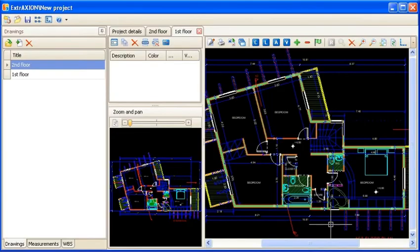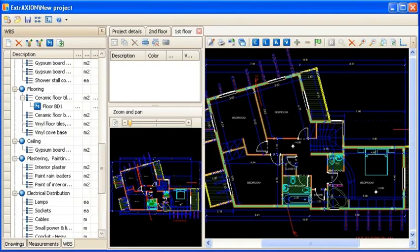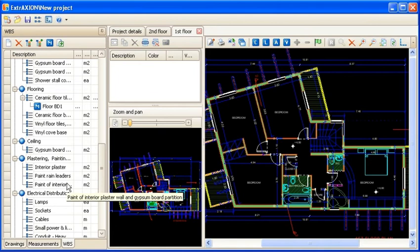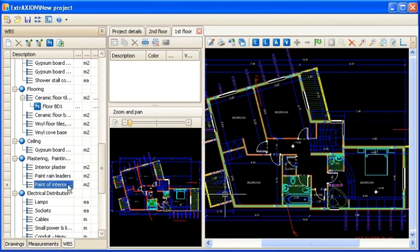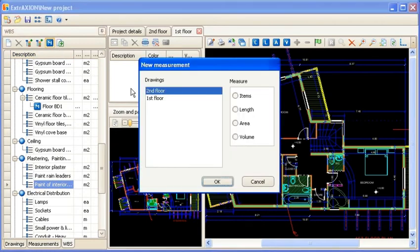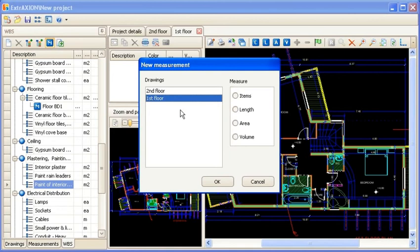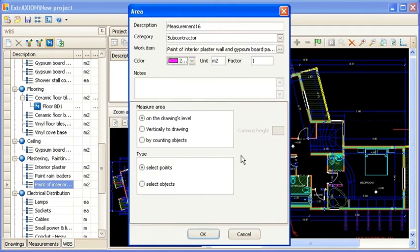It is possible to measure surfaces that are perpendicular to the drawing, even ones with variable height, for example in the case of inclined roofs. From the WBS tab you can choose the item whose area you want to measure, press the M button, choose the appropriate drawing, select area as measurement type, and click OK.